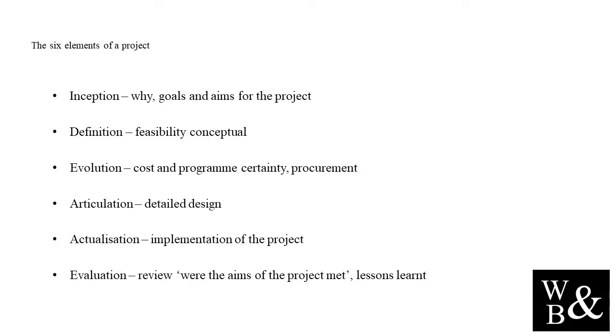Now, at this point in the project, further team resources are growing to bring in the procurement and legal teams. Further stakeholder engagement is needed in this element of the project before final details of the project are established, and we move on to the next element. Furthermore, engagement of the supply chain for the initial project induction is advised. In this element of the project, if planning is needed, detailed planning permission is needed with the local authorities.